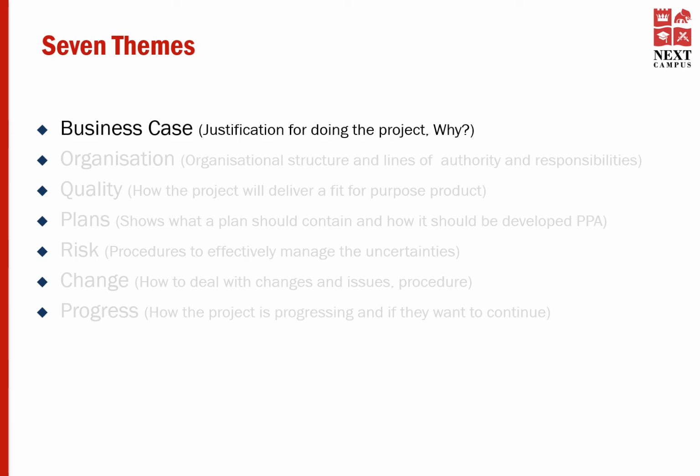At the startup of the project, this would be expanded to the outline business case, which becomes part of the project brief and then becomes a separate business case document, which becomes part of the PID. The first business case document can be completed once the project plan is ready, as it requires the cost, timescales, and product information.